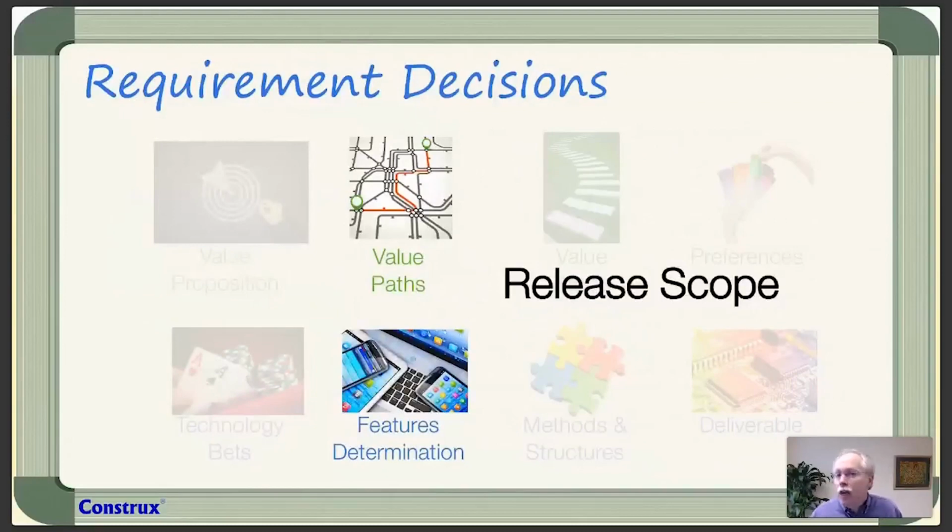Working with another client, and this was really powerful for them because they could start being very specific about what their consumers could do at each release because they based it upon value paths, not just adding features. Because when they were doing features, they said, yeah, we got all these features, but what do we actually give to somebody? They didn't know. In fact, I had another client that was going around looking at all their feature teams saying, what can we ship? What's shippable? They're like, well, we're mostly done with this feature. But when we start switching them to value paths, they're saying, oh, I only need to build this much of this particular feature in order to support that value path. We can ship that in a few months, right?